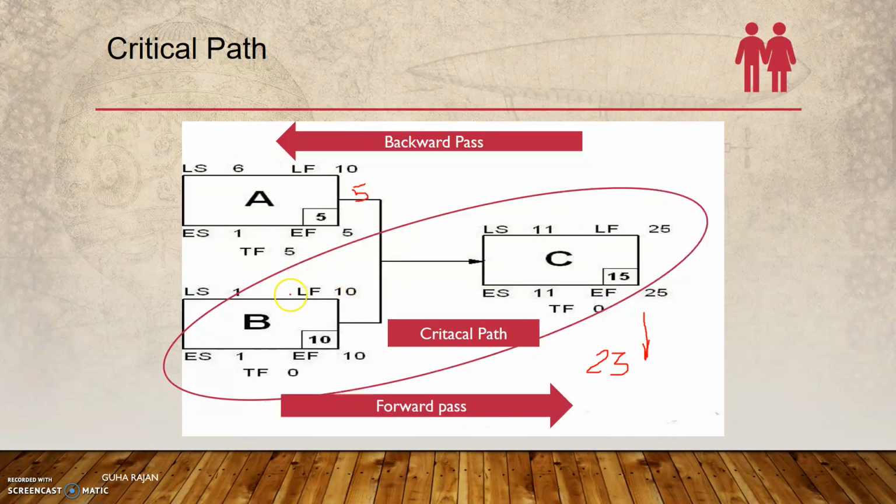ideally what you need to do is fast tracking or the concept of crashing the schedule. Maybe you need to have some kind of parallel activity or have additional resources involved. So in that case, you can complete it on the 23rd. So which means, yeah, you can see that more clearly in the Primavera product itself.